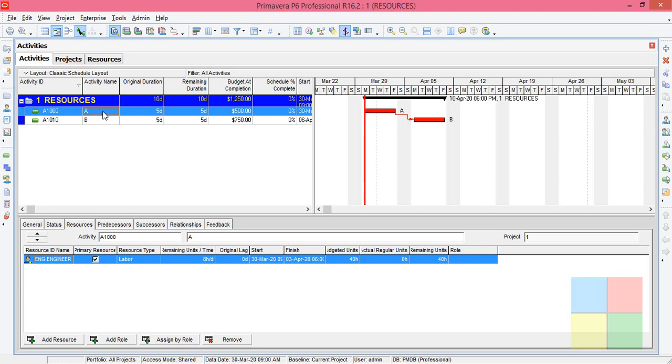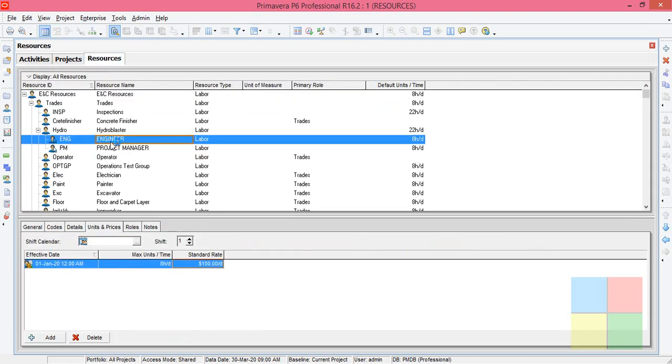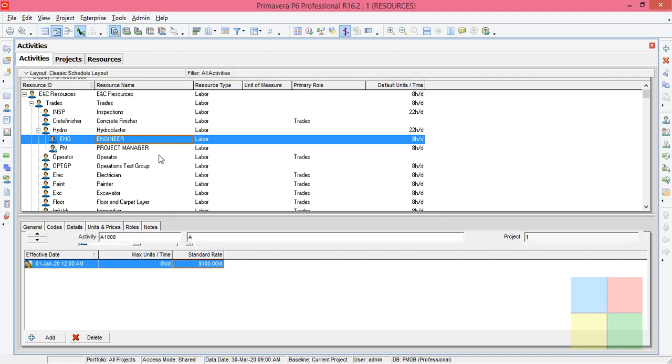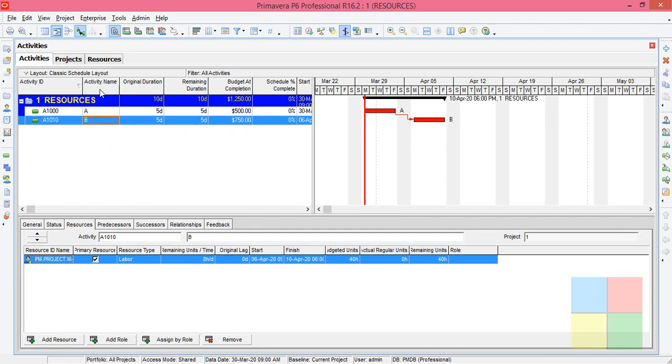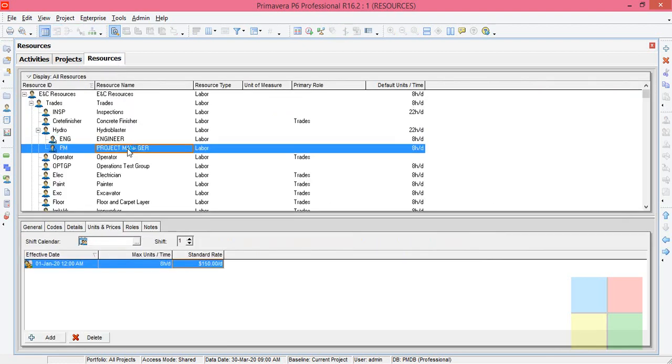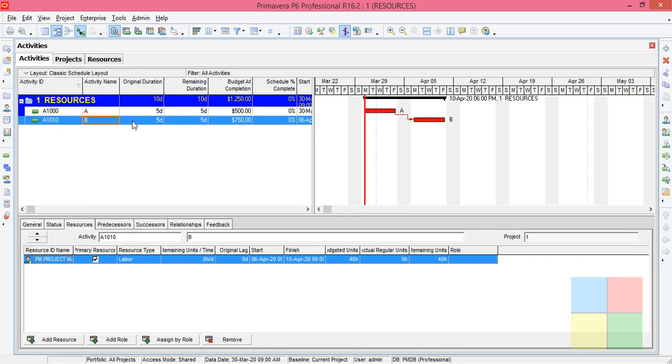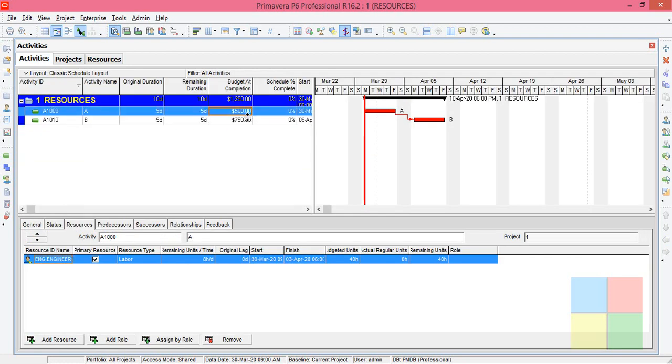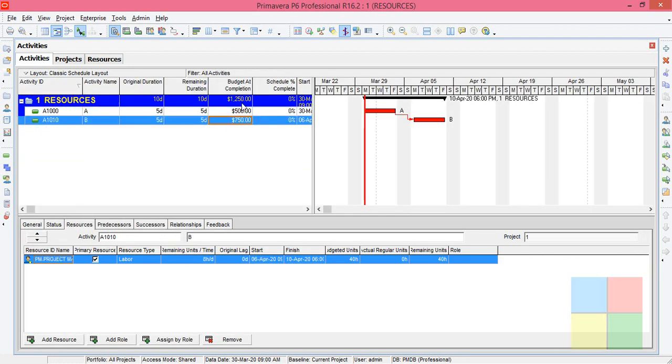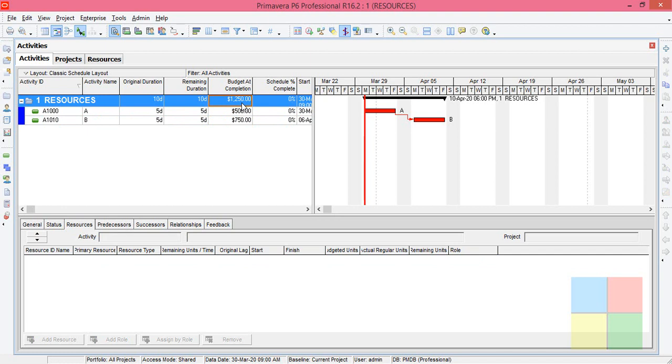For the A activity we assigned engineer, right? It costs 100 per day, so for five days, 100 into 5 will be 500. For the B activity we assigned project manager and his price was 150 per day, so 150 into 5 will be 750. So 500 plus 750 will be 1250. This is how we can calculate the planned total cost depending on the resources that we assigned to the activity.